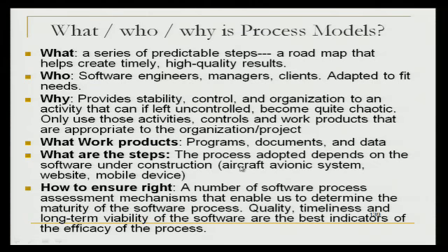So the steps are various. It does depend on the type of software you're building. If you're designing an aircraft avionics system, a safety critical device, a website, a mobile device, they're actually all quite different, and different process models will apply to different types of products. Remember we talked about wicked systems where you don't even know the requirements early on. That wouldn't apply to a waterfall approach, for example, right, where you assume that you have everything up front. So the steps do vary.